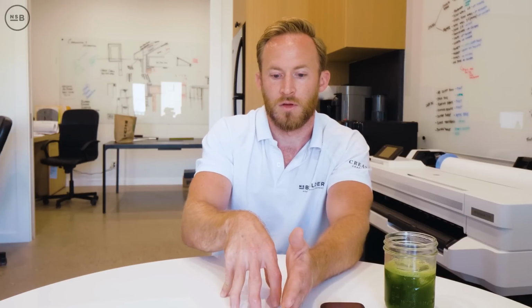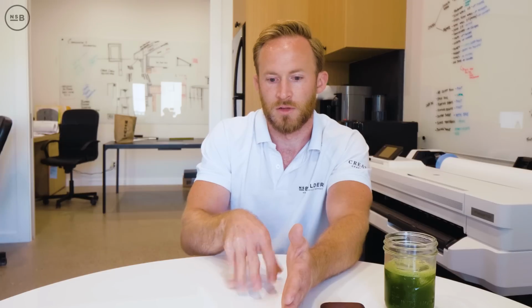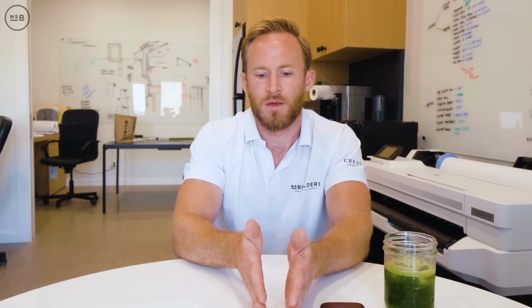The cost plus protects us in the sense that, for the things that are still unknown or have not been decided on, it's not going to be a conversation about how stuff has changed because we didn't assume correctly. It's, hey, it's cost plus, we hadn't made these decisions, this is what it ended up costing. We're costing it, we've agreed to that, and we're moving forward. But doing all that homework and getting to a point where you can be really, really accurate with the cost is really the goal.